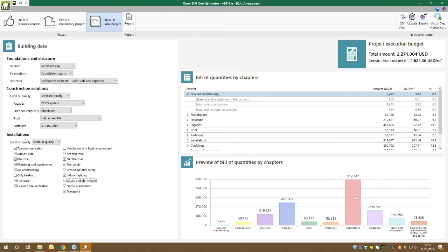And as we include installations, the cost per square meter increases, and the cost of installation also increases. It is logical. We have a calculation method inside the software that takes into consideration the country and the state to correct the prices, and we have some ways to measure, either based on the surfaces, the quantity of walls, or the height of the floors.